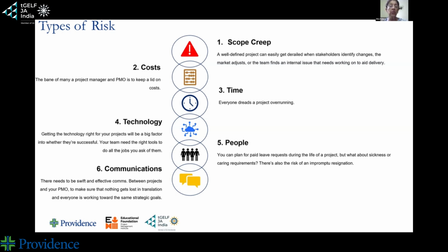So tell your stakeholder, the person to whom you're going to be delivering that project, you think this project can be done in 6 months, but I feel it's going to take 8 months, and here are the reasons. This is why I feel it will take 8 or 9 months. So if you have that right in the beginning, you may still face scope creep, but you've mitigated that risk. You've already put that factor into your initial plan.